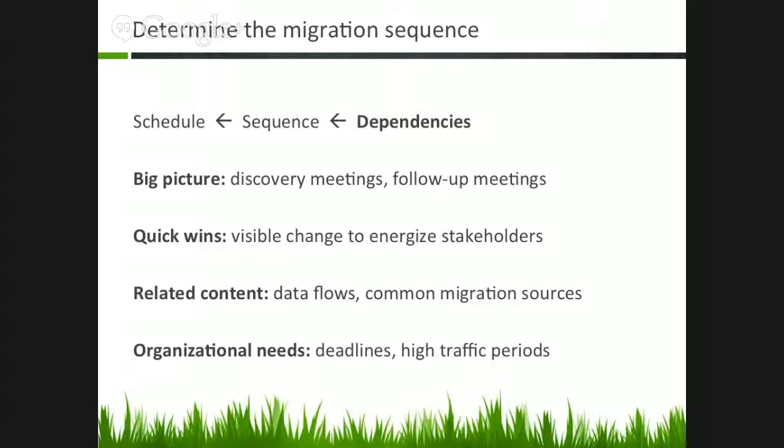Some have to report to Congress information on their website, so we didn't want them to be in the middle of a migration during this period. For example, like the voting rights sections of civil rights, we didn't want to migrate their site in November when they would be receiving complaints from the public about voting rights. So we had to take all that into consideration as we made the schedule.